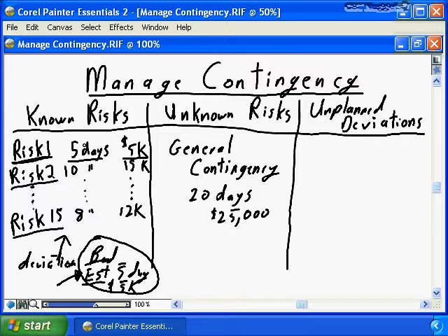You need to reserve each individual risk event, risk 1 through risk 15, the time allocated to each risk event independently, and only consume that time, those dollars associated with that risk event, when in fact the events around risk number 1 have happened. It's 3 months into your project, and you have in fact determined that risk number 1 has happened, and you deploy the time or you deploy the dollars, or better case, the risk has not happened, and therefore you have extra funds available.